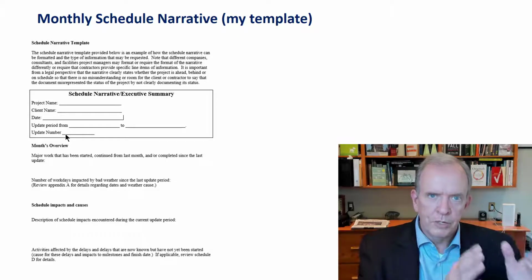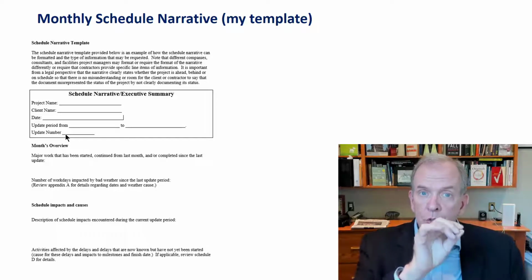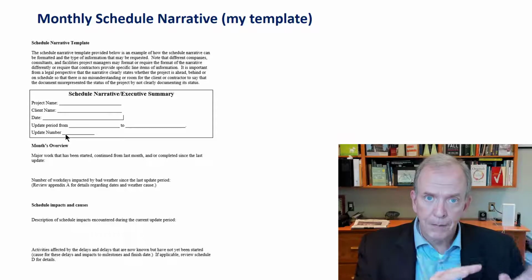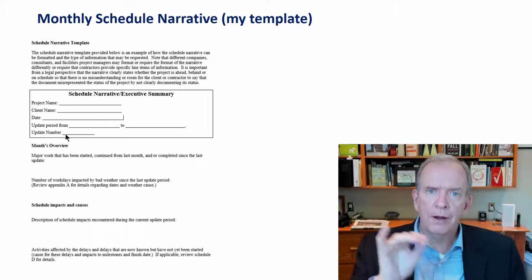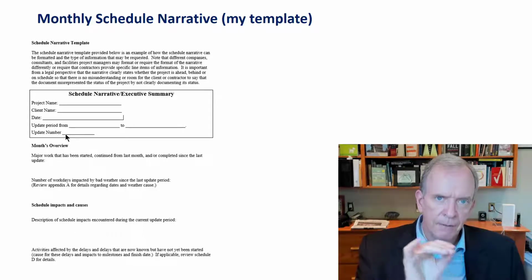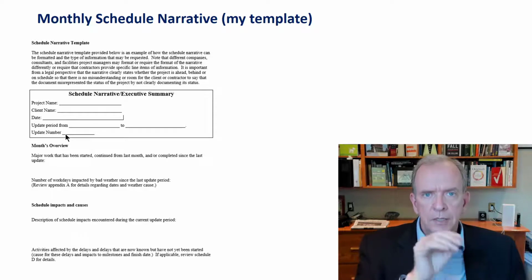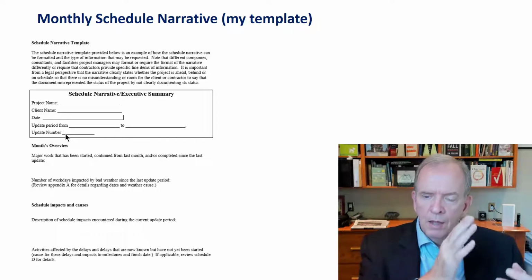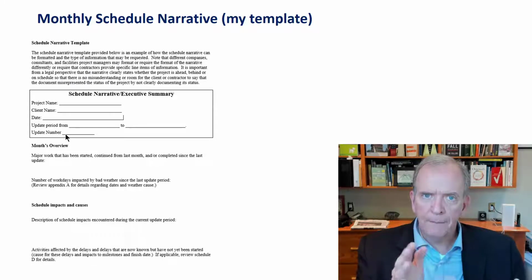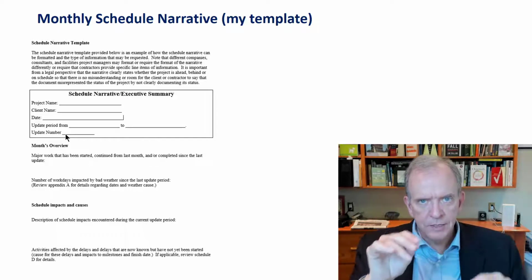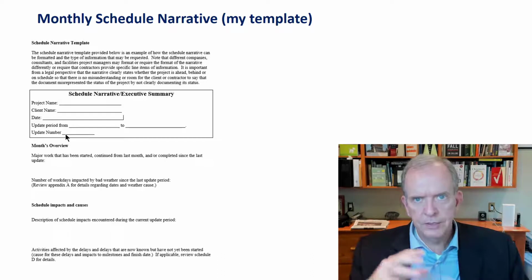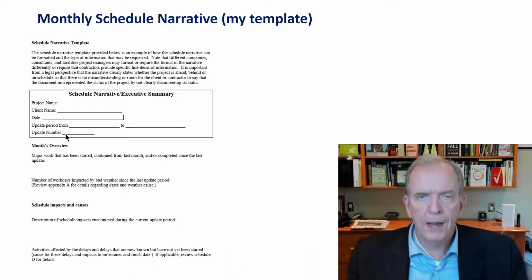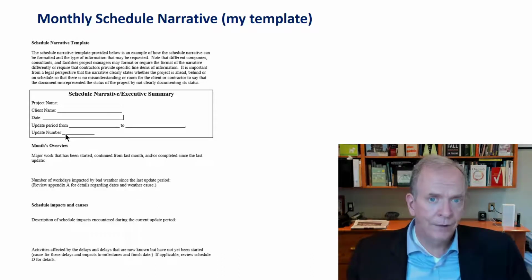And that way you can orchestrate them in order, because this is showing you step by step, month by month, how the project was built. They call this the contemporaneous schedule. This is the as-built schedule for how the project was built. So you can go through the monthly updates, and you can more or less see the pluses and the minuses and all the interferences and how these impacted your project, which is very, very helpful in project management.